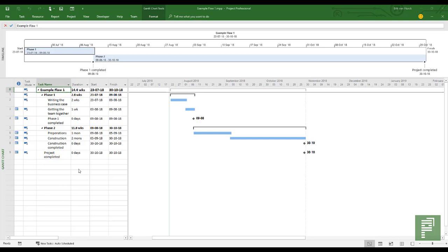Here we have a very short, very easy schedule. From the looks of it, it looks okay, right? It has all these cascading waterfall-like tasks, it has milestones, it has summary tasks, and it has a whole lot of blue calendars. Well, these blue calendars actually are constraints. You don't want to have any constraints, or you want to have the least amount of scheduling constraints in your schedule.